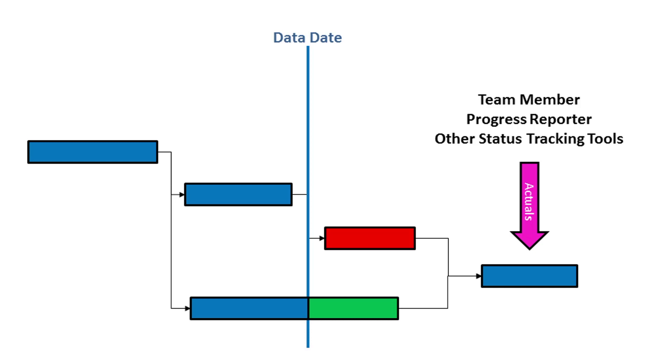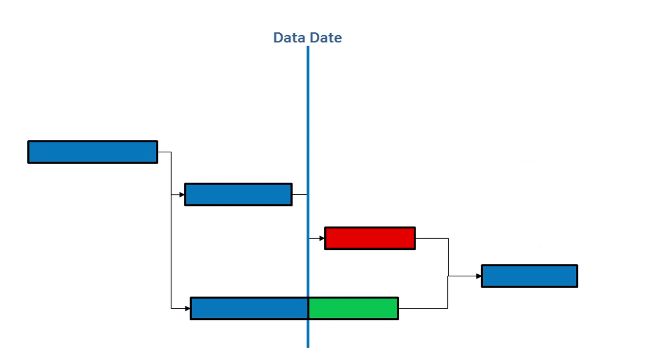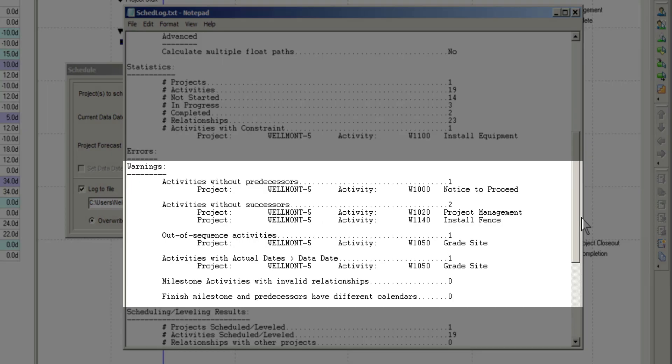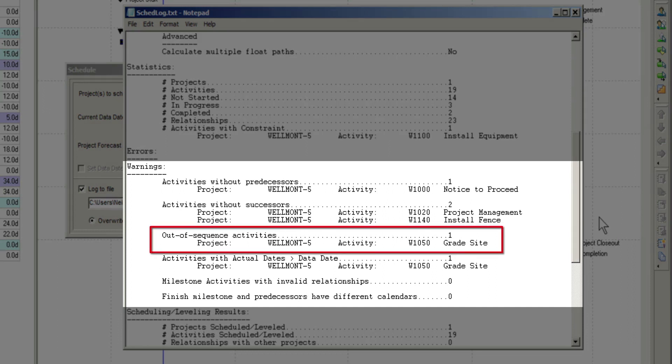Indeed, so can any other external system that feeds status to Primavera P6. The P6 schedule log reports these in two possible ways under the Warnings section. First, the affected activity may appear under the Out of Sequence Activities heading.